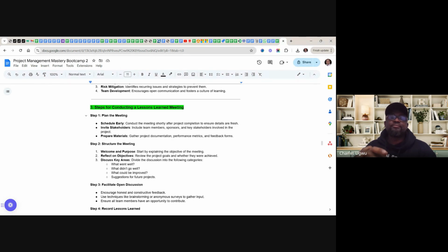Schedule early meeting. Conduct the meeting shortly after project completion to ensure that details are fresh. If you have been having meetings to capture the documents within the project phase, it is helping you to capture the documents. So immediately at the end of the project, we conduct the main lessons learned, where we document the whole lessons learned and we put it in the project repository or archive. It should happen immediately after the end of the project. That is the main lessons learned.